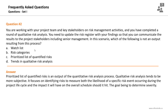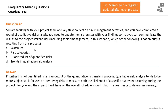Trends in qualitative risk analysis is also an output — it's a risk register update resulting from the qualitative risk analysis process. A prioritized list of quantified risks is an output of the quantitative risk analysis process. Qualitative risk analysis tends to be more subjective; it focuses on identifying risks to measure both the likelihood of a specific risk event occurring and the impact it will have. You need to understand the risk register and risk report updates that occur after each risk management process.